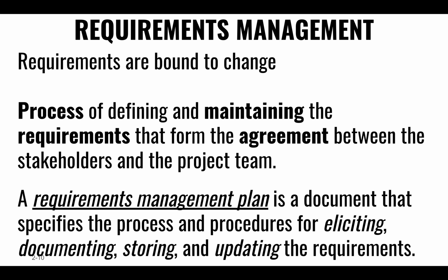Requirements management, as I mentioned earlier, these requirements are going to change over time. We need to set up a process by which we are going to allow these requirements to change over time, right? Usually it will be a submission, a request of change of requirement, and it goes to some committee that oversees all the requests that were made to change the original requirements. And they will talk to architects, and they will talk to all sorts of stakeholders, and say, "Are you okay with this change? Does everybody agree with this change?"